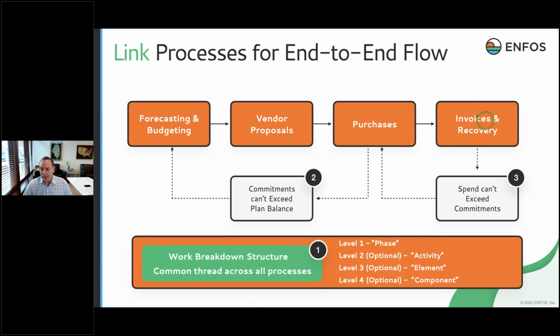And if I start at the bottom, my spend, which comes through my invoices and my cost recovery, right? This is linked to my purchasing, not just at a PO number or work order number level, but at a project management level of granularity. And I have an example to show you in a second about that. That purchase or that work commitment to the supplier started out as a proposal, right?